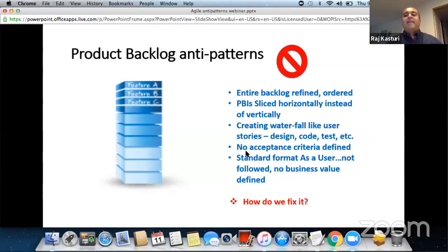It's important to have acceptance criteria defined, right? If you're using user stories, having acceptance criteria makes it easier for the development team to go back and work on those things. It's helpful for writing test cases, and helpful when the work is done, so that it's easier to go back to the acceptance criteria and say, hey, product owner, this is what you have mentioned.